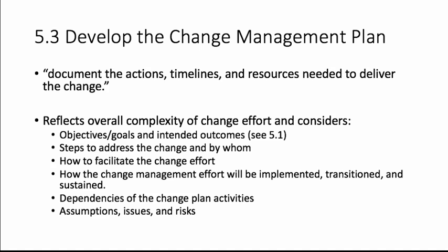The change management plan should reflect the overall complexity of the change effort and consider objectives and goals, intended outcomes of the change effort as defined in 5.1, evaluating change impact and organizational readiness, steps to address the change and by whom, how to facilitate the change effort, how the change management effort will be implemented, transitioned, sustained, dependencies of the change plan activities, and assumptions, issues, and risks.